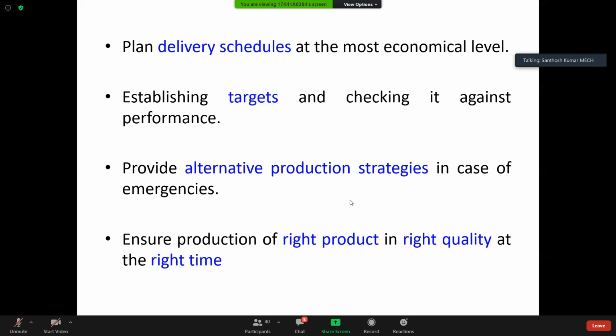If there is an issue in industries where you don't reach the customer requirement in time, in this example within 2 months, the customer will levy a penalty of 2 to 3% or sometimes 10% of the total product cost. So this is very dangerous to any industry. That's why delivery schedules are very important.